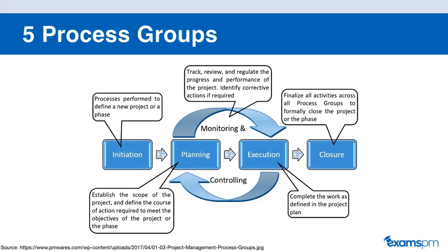So at the end, we will have our project deliverable, and then we move on to the closing phases to close out the project. Now, the project doesn't end when the deliverable is finished. You still have to go through the closing processes, which include formally giving notice to your teammates to let them know that the project is over, documenting your lessons learned, closing out the project, etc., etc.